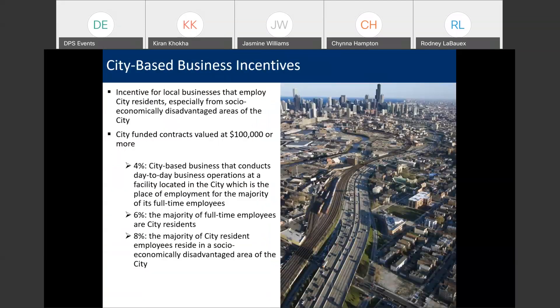Next, we're going to talk about city-based business incentives. When I say incentive, these are opportunities to artificially reduce your bid price for evaluation purposes. So, if you're eligible for an incentive, we will reduce your bid price by the applicable percentage when comparing it to other bids. But if awarded the contract, the contract value will be the value of your actual bid before the incentives were applied.